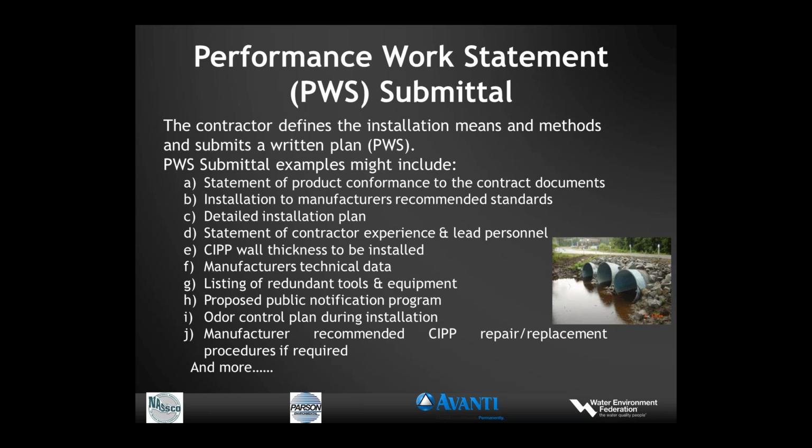Other important provisions include, of course, installation to the manufacturer's recommended standards. And as shown in C, a detailed installation plan. That is the crux of the performance work statement, how the product is installed. It should also include a statement of contractor experience and lead personnel to include resumes. The contractor should have the experience to install a project of this size, and it should also have the lead personnel on the job that have had experience with this type of project.